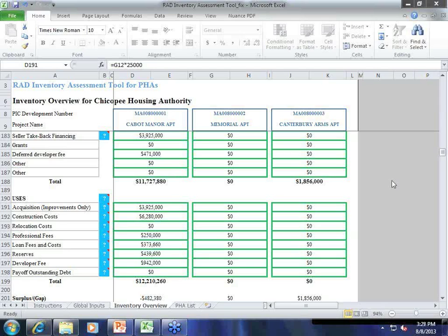Well, I would say that for putting in the application for RAD, it's fine to use whatever assessment was in your last PNA. You know how we all had to do it, every 5 years you have to do a new PNA? Use that number. If you know for sure the number's higher than that because you know of some additional things that have happened since the PNA went in, well, you might want to go ahead and add them.